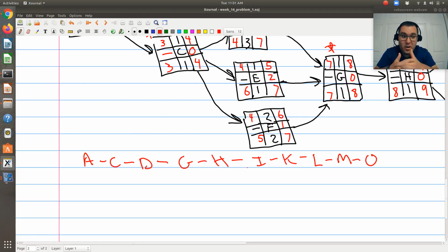Right? For all other activities, we have a float. So there's going to be some window during which that activity can begin, and the project will still be completed on time. And so if I wanted to try and accelerate the project, my focus would be on my critical activities, because it's these critical activities which are going to dictate that project's length.